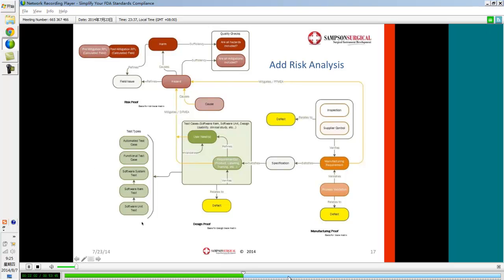And that way, when we get an audit, no matter where they hit you in the audit, say they go into your process validation and say, we have a process validation that we believe is wrong, what's the impact to the user? Well, immediately you can back in and get a progression right up to the harm and say, if we have a problem with the process validation on a bar sealer or a gluing process or whatever, we expect that if there's a problem with that process validation, it's going to result in X harms, and then we can look in the field and quickly see whether we saw an increase in that harm or not.